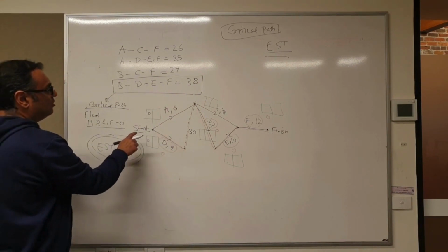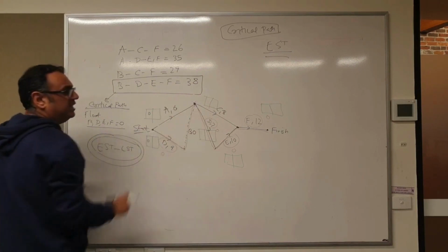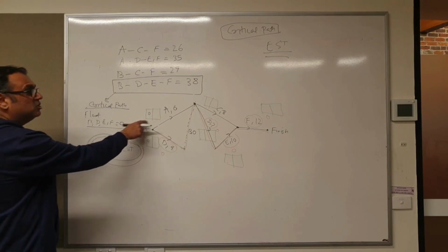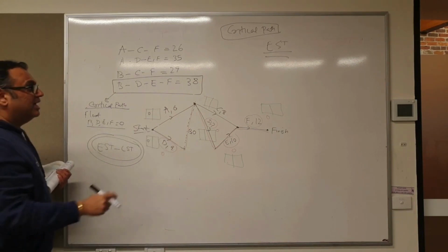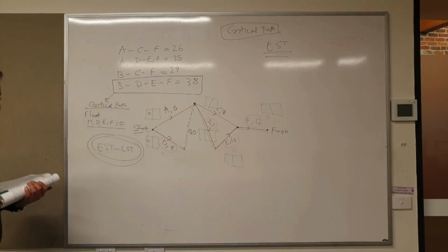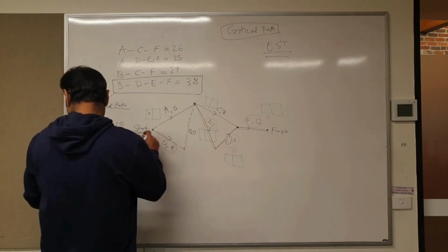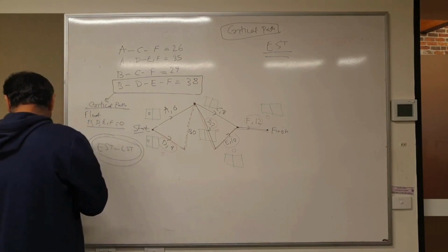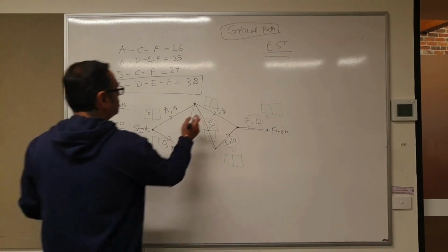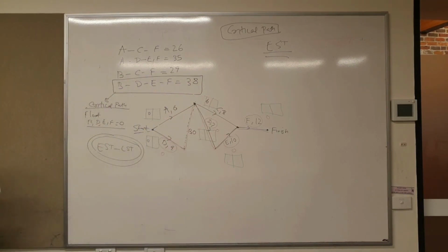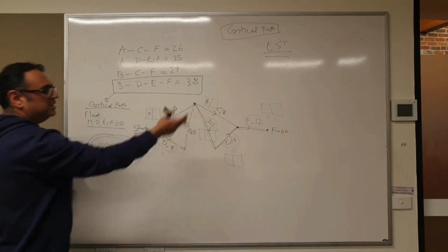So let's go from A to C. A was a 0 at the start, took 6 minutes, and you eventually reached C. So by the time you reach C, this was 6, right? Because you spent 6 minutes. Let's say this is minutes.